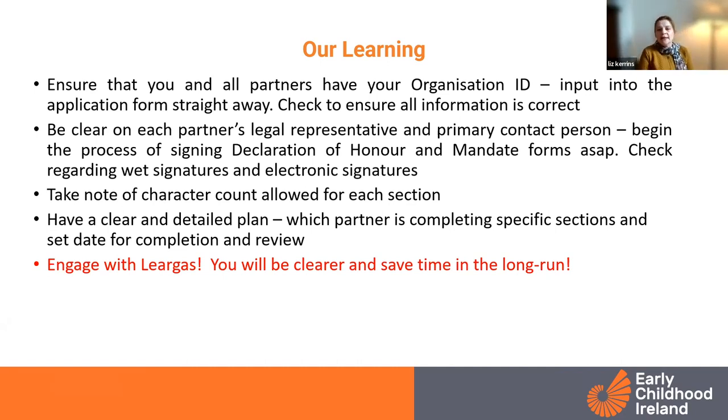Have a clear and detailed plan when you're setting out to develop the application form, as far in advance as you can: which partner is completing which specific section, who's reviewing it, and get as many people reviewing it and looking at it as possible. Set dates and try to stick with them for completion and review of all of that plan, and of every piece of input into the application form that's required from all the partners.